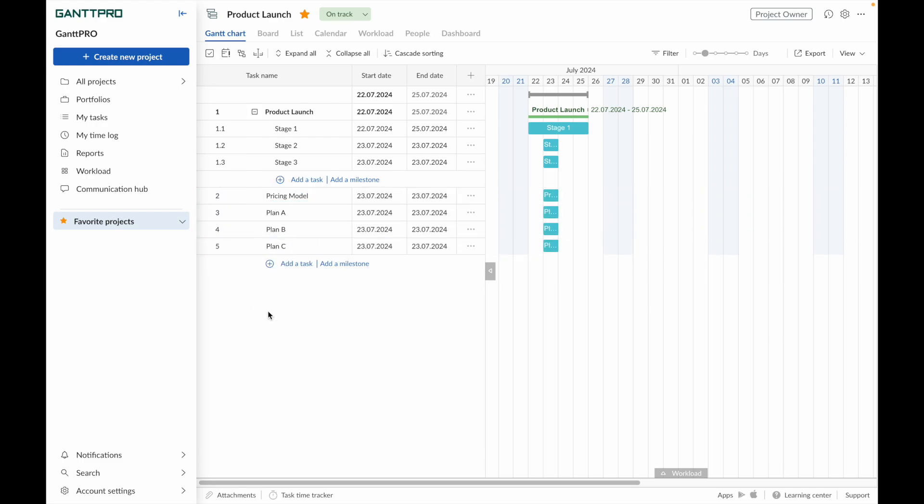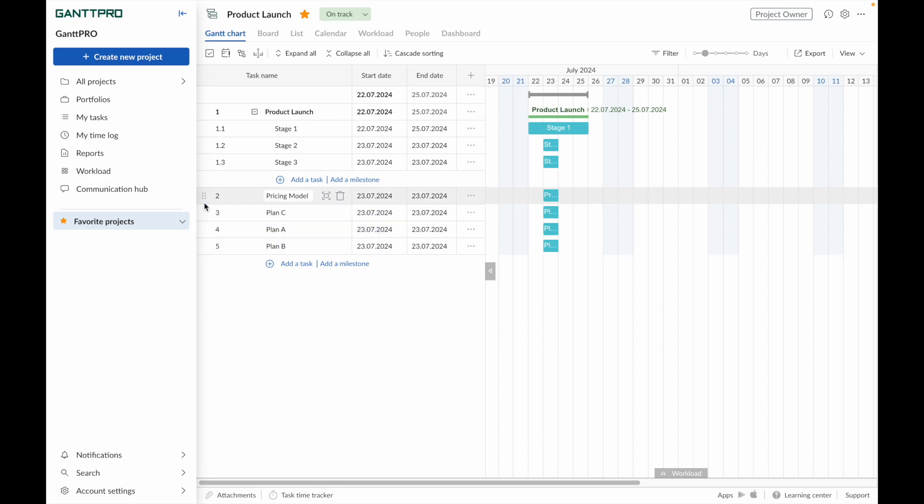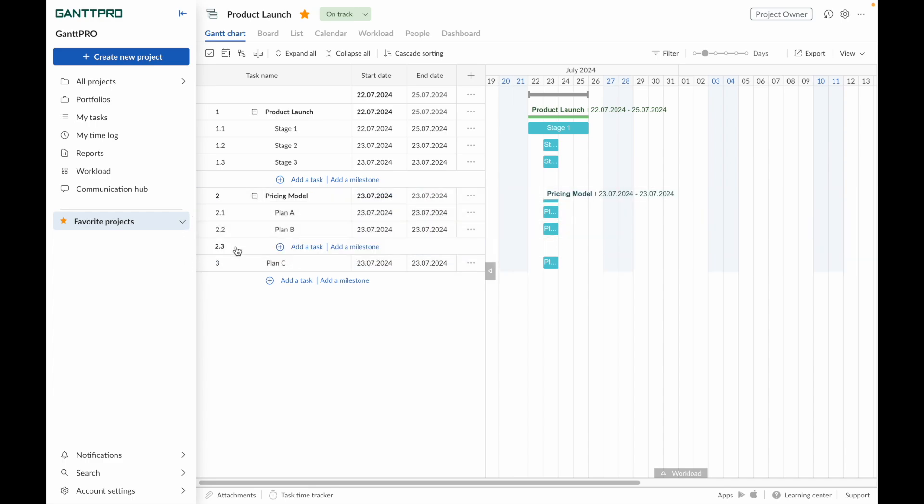You can change the order of tasks using drag and drop, or change the project structure by making a subtask from a task.